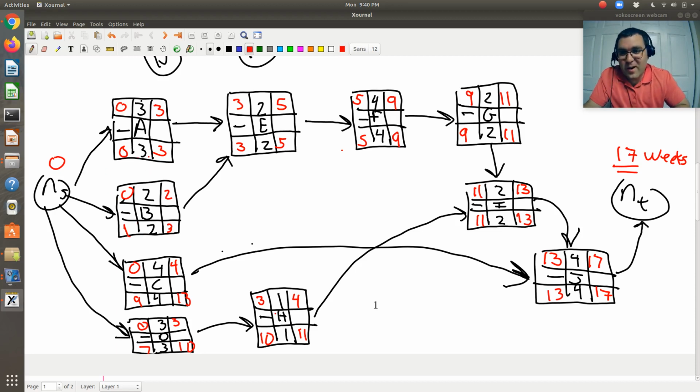All right, so now we need to go and calculate our floats. Let me write our floats in blue. Looking at A, the earliest and latest possible starting times and finishing times are the same, so I have a float of 0. That means this activity must begin in week 0 and must be completed in week 3 for the project to be completed on time.